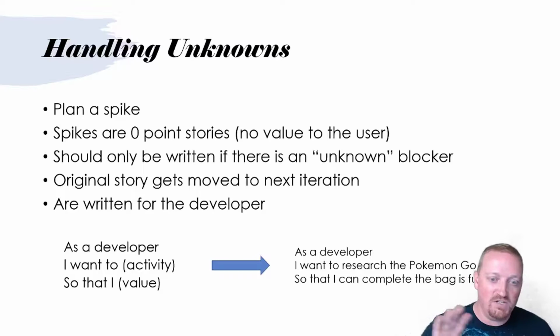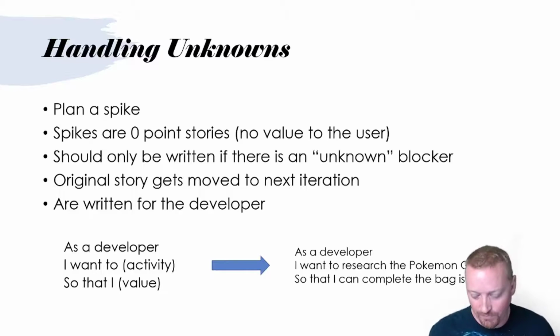That is how you plan a spike. You put it together very similar to a user story, but the user is actually a developer, and the value is always pointing back to the original story that caused the spike to be written, okay?